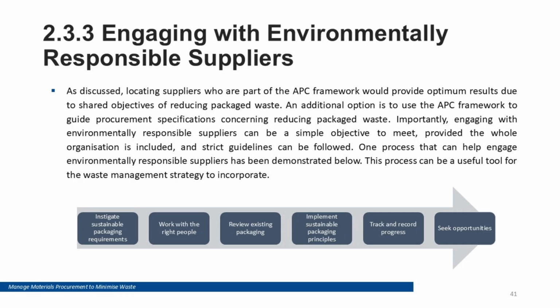Supplier selection affects waste outcomes across the supply chain. Environmentally responsible suppliers can provide products with recycled content, take-back programs, reduced packaging, and evidence of responsible manufacturing. Engagement should include clear sustainability requirements, agreed reporting, and regular review of supplier performance. Record supplier commitments and outcomes so they can be monitored and improved over time. Strong supplier relationships make waste minimization easier to maintain throughout the project.